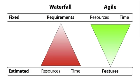So why is this happening? To figure that out, let's look at the difference between traditional methods of project management and Agile methods. Waterfall, which is one of the traditional methods, is very plan-driven, whereas Agile is very value-driven. The way that we keep things value-driven in Agile is by using the product backlog, which is basically a list of all of our requirements written as user stories. It lives as long as the project and evolves along with it, meaning items are pulled in and out and constantly shifted about. It's also sorted in order of priority.